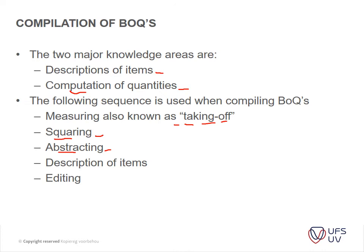For instance, if you measure foundation wall length, that length can be used for both brickwork in foundations and in the superstructure. The amount you've taken off is squared and then allocated or abstracted to different items. Similarly, a square meter measurement for tiling can be used again for ceilings, and the circumference can be used for both skirtings and cornices. Squaring is grouping your items together, and abstracting is allocating them to different items in your BOQ.